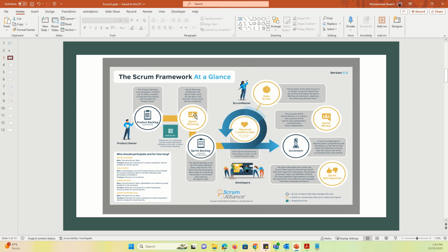In the sprint planning meeting, the items from the product backlog are opted by the team for delivering the product increment and realizing the sprint goal. This sprint can be of 1 month, but ideally 2 weeks. The Scrum Master conducts the daily Scrum. The purpose of the daily Scrum is to discuss the progress and to identify any issues faced by the team member.